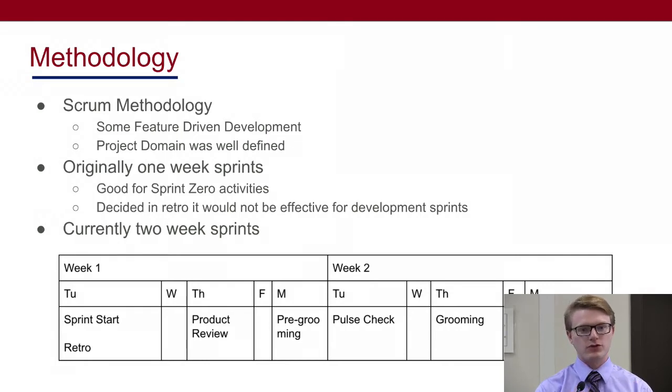So we grouped our features by user persona. We wrote up documents for each user persona, and that gave us our framework for our full year plan going forward. And it defined all of our epics that we were going to work on.